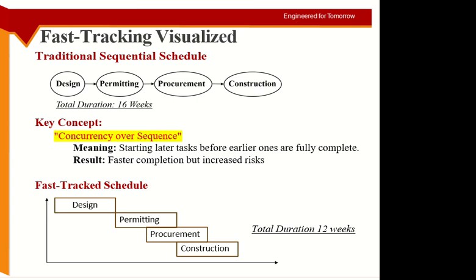You wait for a few days and you are now sure that it has taken initial approval. I am just waiting for the final order, because I know there is very little chance that my design will change now. So you start the procurement, and once the approval comes, you can start the construction as well.